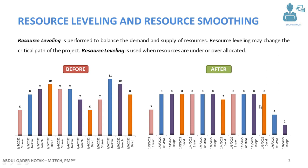As you can see, the project was supposed to be completed from January 3rd to January 5th. But now, when we have leveled the resources, it is going to continue from January 3rd to January 6th, which means that resource leveling will impact the critical path of the project.